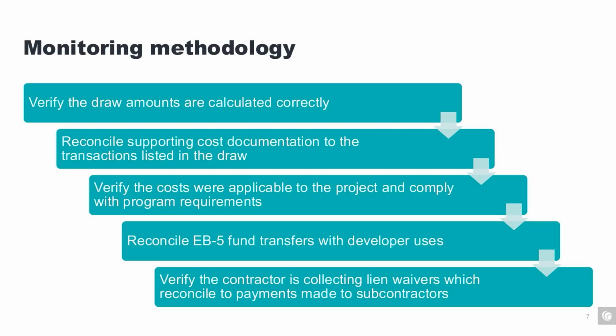Furthermore, when a lien waiver is missing for an extended period of time, not that one was lost in the middle of a project, but perhaps a trade contractor hasn't been paid now for 3, 4, or 5 months, these become red flags that lead to claims and litigation. And whenever a project has claims and litigation, it adds a significant amount of complexity.